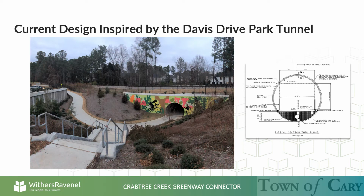The White Oak Creek Greenway was completed approximately 2 years ago, and it includes a circular tunnel located at the Davis Park Drive crossing under the existing railroad right-of-way. This tunnel was built using the jack and bore method and structural liner plates. Our team met with the Davis Drive Park Tunnel team and studied the pros and cons of using a circular tunnel versus a rectangular tunnel option. During that evaluation period, it was determined that following this method and applying some of the lessons learned would make our project much more cost-effective and cut several months of construction time.